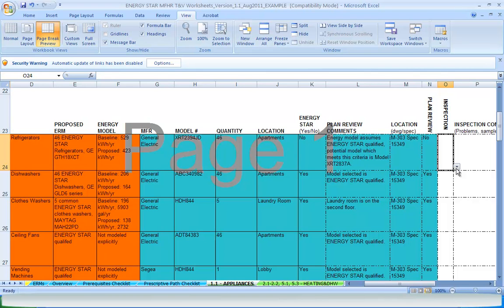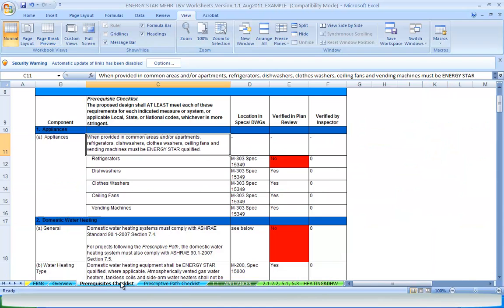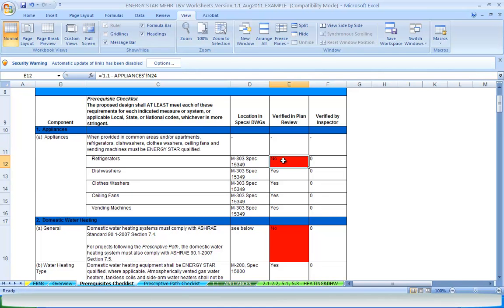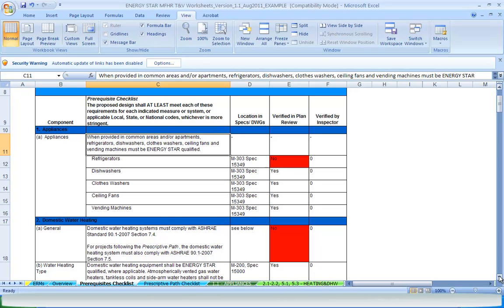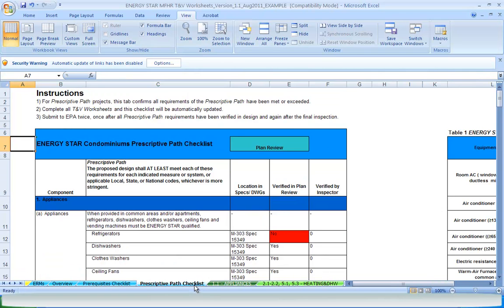All prerequisites listed throughout the TNV worksheets are linked to the prerequisites checklist. There is a list of all prerequisites included in each protocol as well as the verification columns to indicate whether or not the project is in compliance. All prescriptive path requirements listed throughout the TNV worksheets are linked to the prescriptive path checklist, which is very similar to the prerequisites checklist.